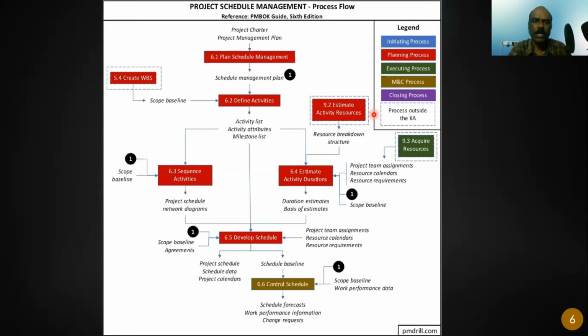That also is possible. Sometimes they will say, okay, we have only one diaphragm wall grab. You need to plan for one diaphragm wall grab. Then accordingly, I need to estimate the durations. If I need to do so many panels, each panel, how many days it's going to take, right? How many grabs I have, right? Accordingly, I need to estimate the durations.